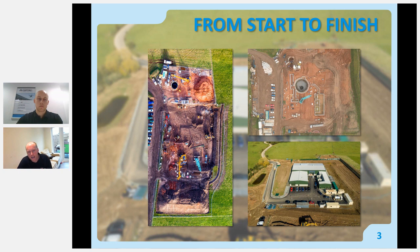So it's worth asking these questions and trying to understand what they're doing and how that's being put together. But also understand what's not been asked of you. If you're going to see through the project life cycle, you're going to try and predict those steps or those things which you weren't asked for, but you know are coming up. So, for example, once the road's been constructed, they're going to want a map of the site or something, but they've not asked for it. They just said, we just want a video of this particular site. But with that foresight, you've baked that into your plans, and you're prepared to go out and capture the right information to give the business that added value.